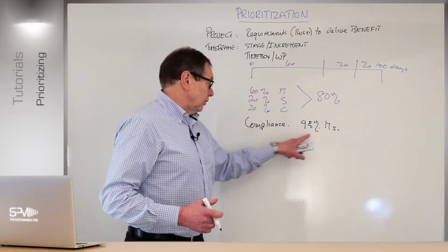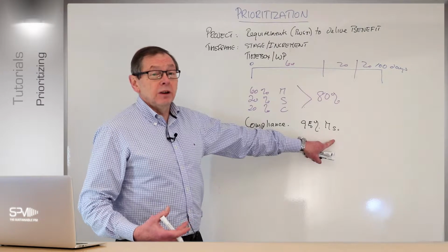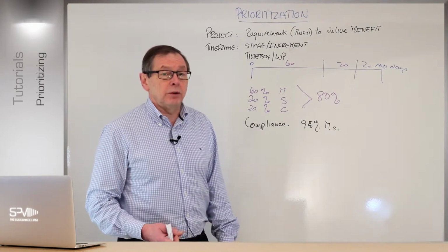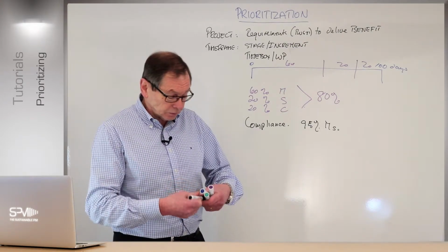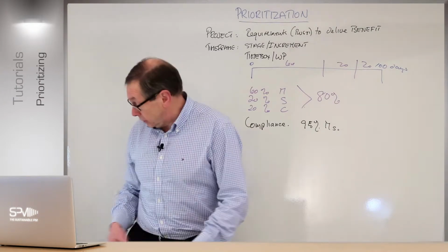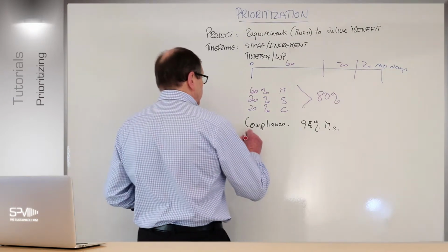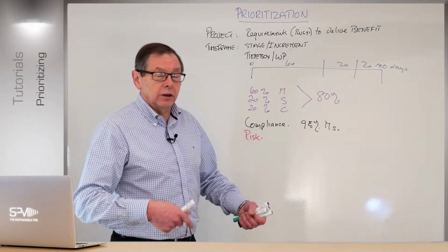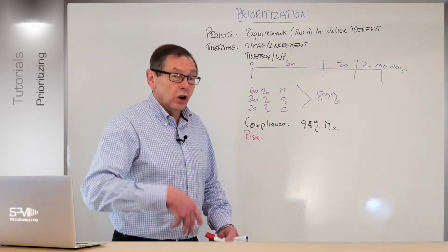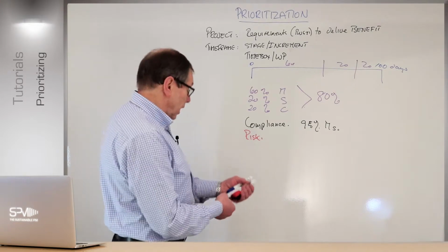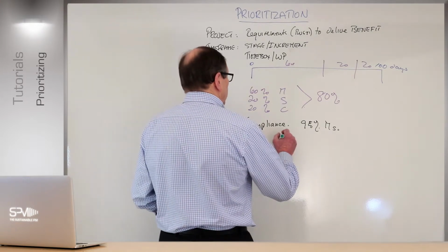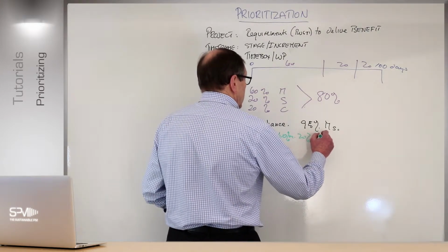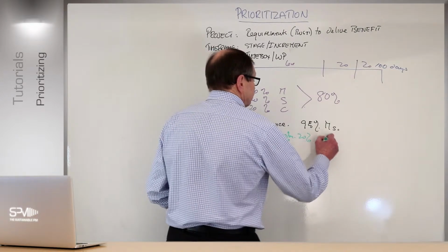Now, the more understanding you have about the solution and the experience of the team, the less critical that is. But obviously it poses a bit of a risk in being able to draw that. We know that this is what happens in projects. That's part of the riskiness there. On the other side, talking about riskiness, it might be that if I've got quite a risk type project, right, or the solution's not known, the instability of the business or the teams doing the work, or it's quite a new concept, you might find actually that your requirements are down to, say, 40% for your musts, you might have only 20% for your shoulds, and then you've got 40% for your coulds, right?